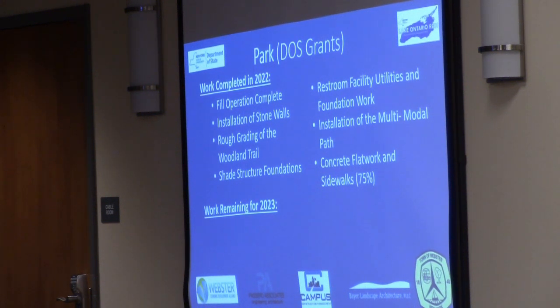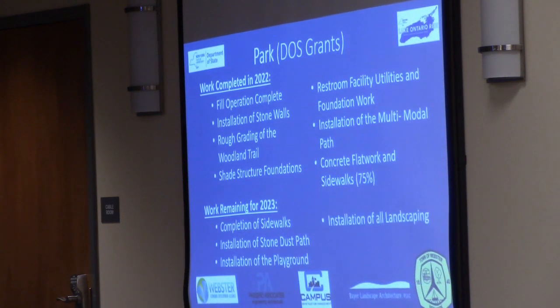So work for 23 that remains is the completion of those sidewalks, the installation of the stone dust path along the woodland trail, the installation of the playground, installation of all the landscaping, trees, bushes, and then installation of the actual shade structure and the restroom facility.